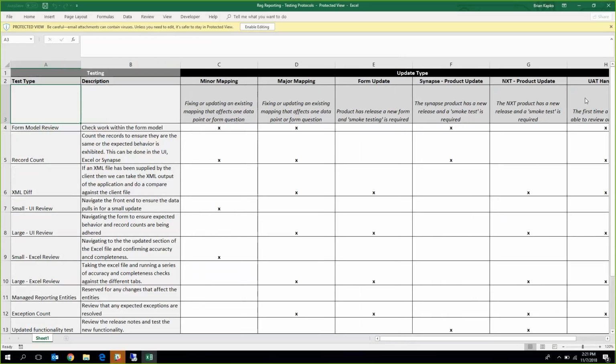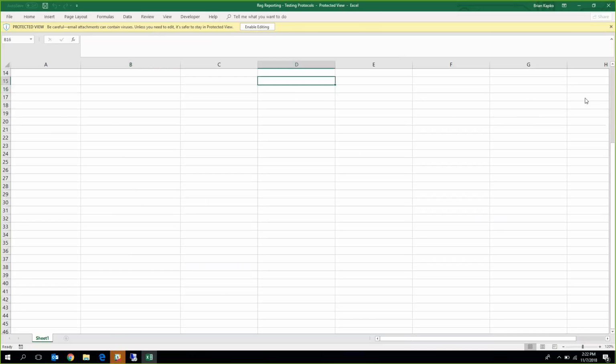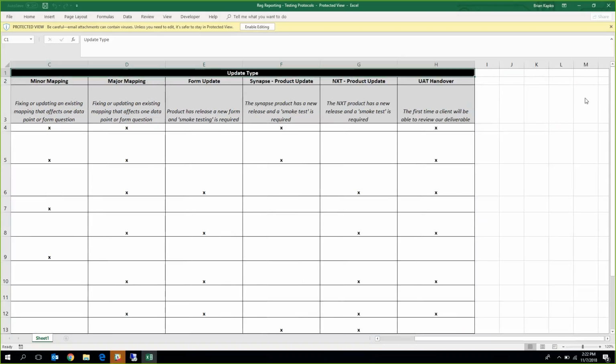So let's take an existing client that's in that stage, like Mitsubishi. We're building in phases based off data availability. We're doing handoffs with the clients in an agile fashion: hey, you can check this, hey, you can check that. I would expect this UAT handover to happen every time that happens. It should not be as big because of the volumes of data that we're handing over in those smaller chunks, but this is the day lag between you being done and them getting it. I don't want to see project plans where I end this day and the client sees it that same day.